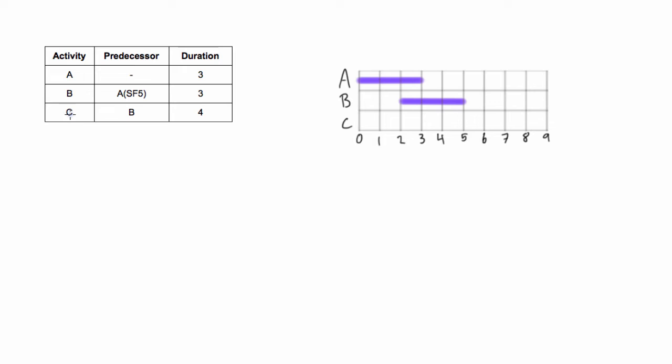Now the next one we have, this is just activity C depends on B. It's just a regular finish to start relationship. Again, if there's no letters here you just know it's just a regular finish to start relationship, so C can start as soon as B is done and it's a duration of four. So we're gonna go from five, one, two, three, four, up until the end of day nine and that will finish off our project for us.